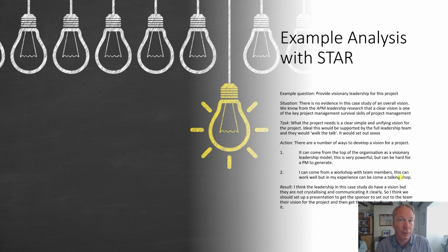They may not have thought about your project. It may not be top of their agenda. So in that case, we can do a sort of bottom-up approach where we can work within the team, come up with a project vision and mission, get that signed off by the project board and the governance arrangements that we have, the steering group. So it's a sort of bottom-up vision that we've generated.